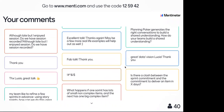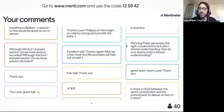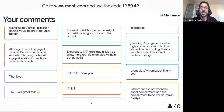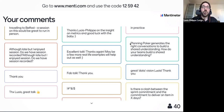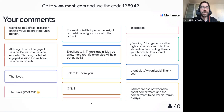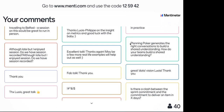A question in the comments: planning poker generates the right conversations to build shared understanding — how does your team build shared understanding? What I use is the service level expectation instead of planning poker. The shared understanding is still there during planning or refinement to understand customer needs, but we use historical data through the SLE instead of a planning poker estimation conversation. For fun: how many hours per week are you spending arguing if it's a two or a three? Even if it's just one hour per week with five developers, that's five hours per week you can give back to your customer to create value.